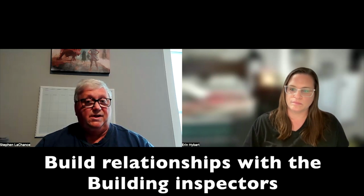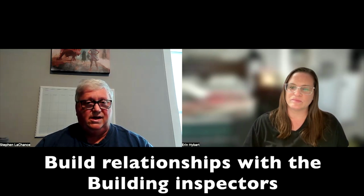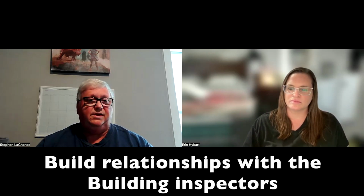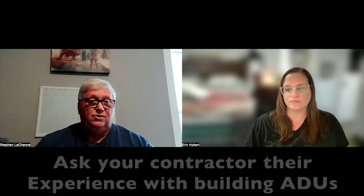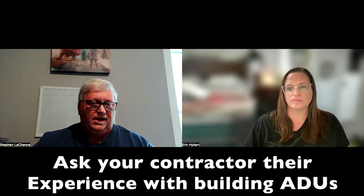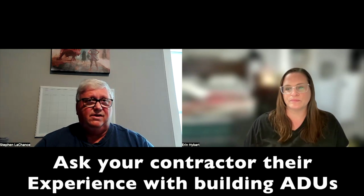The other thing that I would do, this really worked out for me just because I was the one that had to pull the permits: make friends with the building inspector. These guys weren't trying to give me a hard time. They wanted the structure to be correct. The guy that I hired didn't know certain things. He didn't use the hurricane ties, which tie all the framing together. He didn't have enough anchors in the concrete to secure that wall to the floor. They saved my backside multiple times.